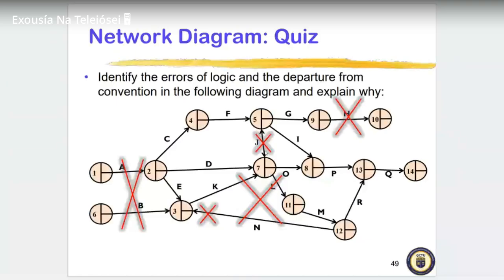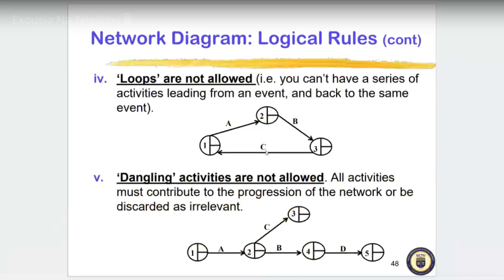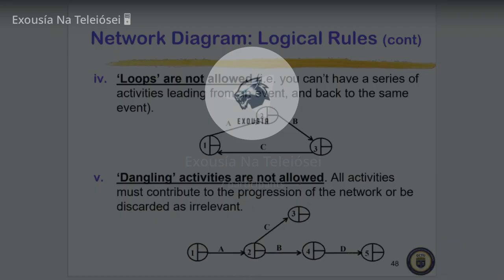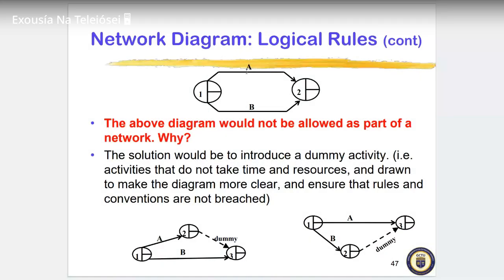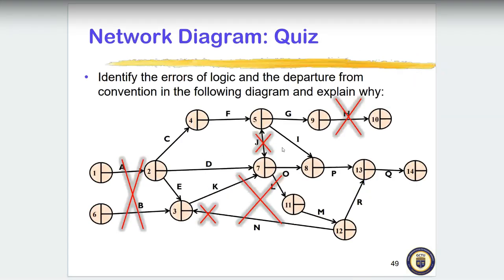See this. Two activities are coming to it. Even it has three, so one must be a dummy activity. They all can come to it. That is why you can see one here, one there. This can only be done maybe in the precedence diagram. But when drawing the activity diagram, we should check out some of these things.